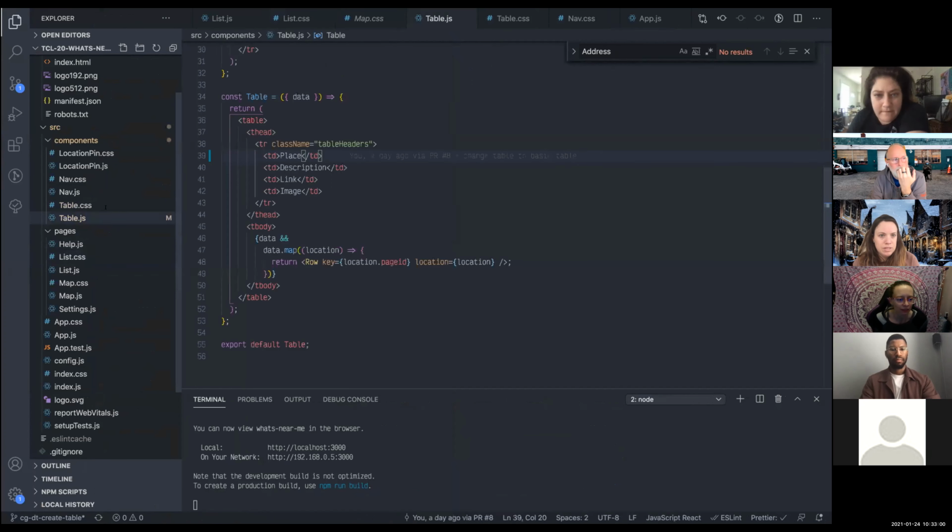So yeah, it is possible to split stories too far. The first one back here is functional versus non-functional requirements. There's a temptation, at least I've seen this at Zapier and places, to say, oh, let's split it along back end and front end, right? Let's have a front end ticket and a back end ticket. The reason that's not a great idea is that neither of those by itself provides any user facing value. They can't be done independently.